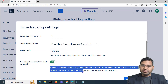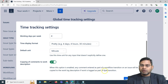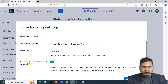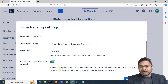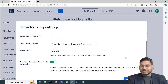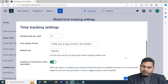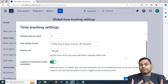Copying of comments to work description — when you enable this option, any comment entered as part of a workflow transition on an issue will be copied to the work log description if work is logged as part of that transition. Every issue has an associated workflow — for example, To Do, In Progress, Done. As part of a transition, say from In Progress to Done, a pop-up appears.